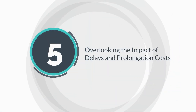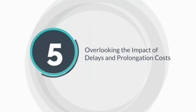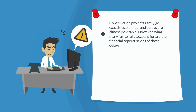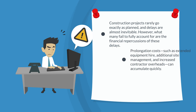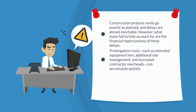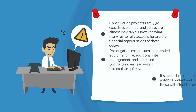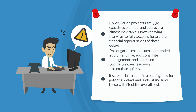Mistake five: overlooking the impact of delays and prolongation costs. Construction projects rarely go exactly as planned, and delays are almost inevitable. However, what many fail to fully account for are the financial repercussions of these delays. Prolongation costs — such as extended equipment hire, additional site management, and increased contractor overheads — can accumulate quickly. If these costs aren't factored into the forecast, the project can easily exceed its budget. It's essential to build in a contingency for potential delays and understand how these will affect the overall cost.